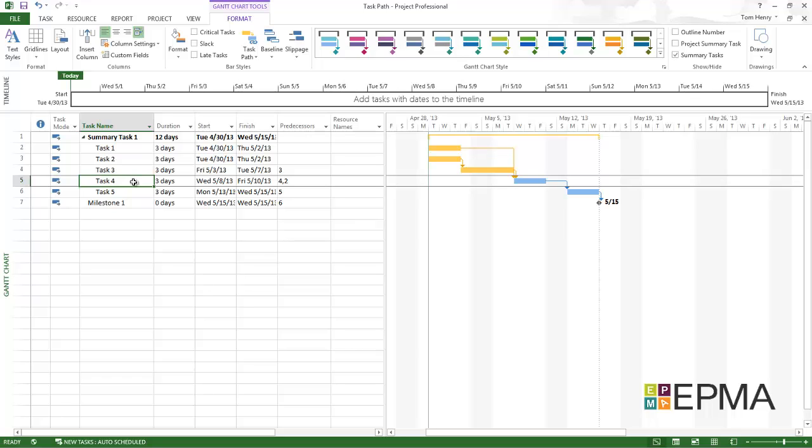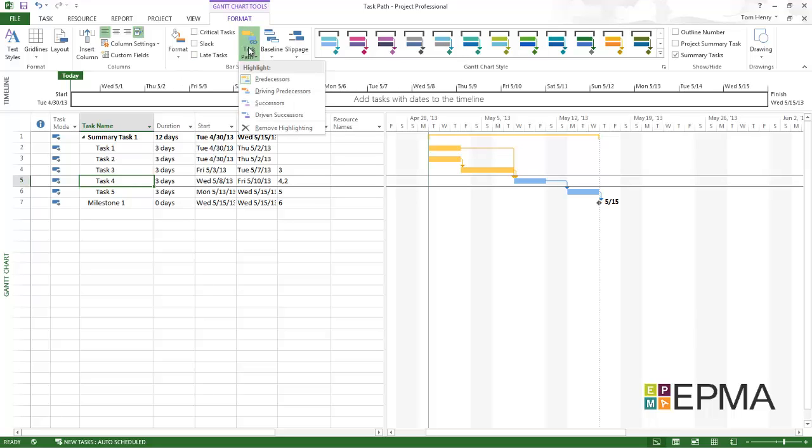Now whilst on task 4, I want to know which ones are driving this task. So if the duration of that task increased it would push out this task that I'm currently clicked on. So that would be a driving predecessor. So I'm going to click on task 4, click on the task path, and I'm going to turn on the driving predecessors.